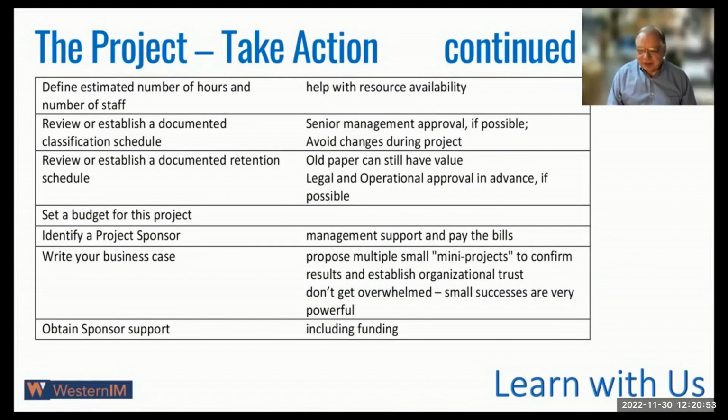Yeah, Rick, I think the really important thing on that slide was the project sponsor. This could be somebody in higher management where you're getting your budget approval, but almost equally you should consider some departmental person where you're going to do the inventory, maybe as your first attempt, because having operational support is critical to the success of your process.